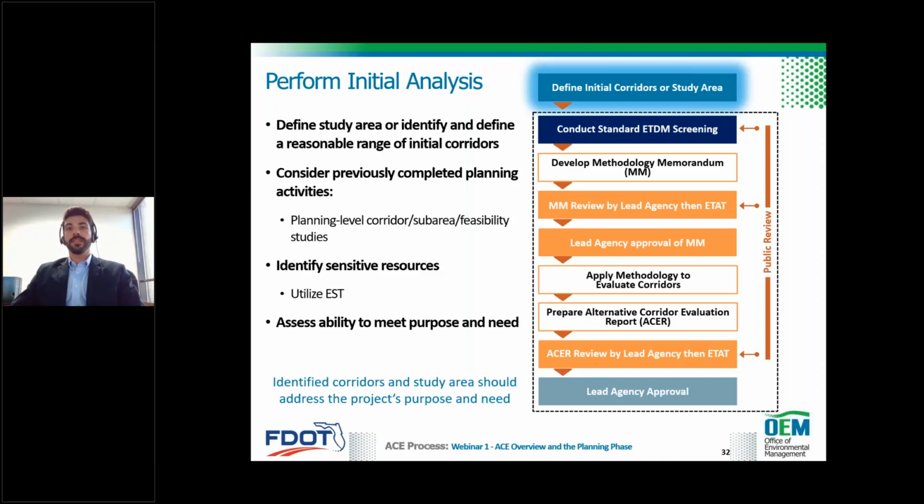You would conduct a GIS analysis to begin identifying the environmental resources in the area. Could be a church, maybe a park, or perhaps there's historical resources. The environmental resource mapping is used to refine the study area and identify corridor paths, where you can place a corridor that avoids or minimizes impacts to resources, whether that's human or the natural environment.